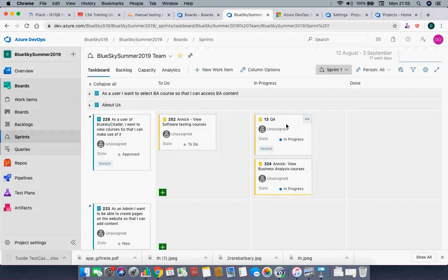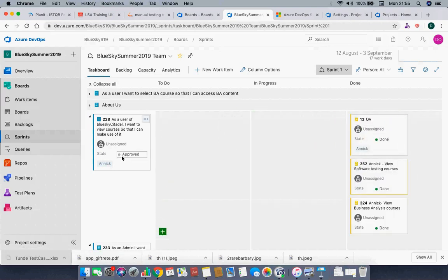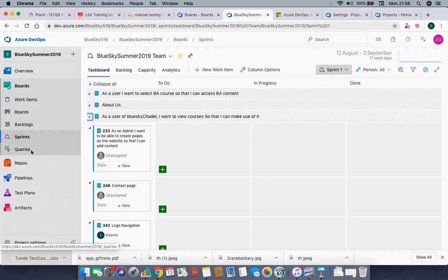The issue now is, when you are moving everything, you move all the tasks, you have to come in there and move the state of the ticket. So if you move all the tasks to done, and you don't move this particular PBI to done, you've not actually done anything basically. If you don't have good board management, you might move the task and not move the product backlog item, which is not a very good practice. So that is very, very important to get sorted. That is the disadvantage of that, and it's based on what your company actually chooses to use.